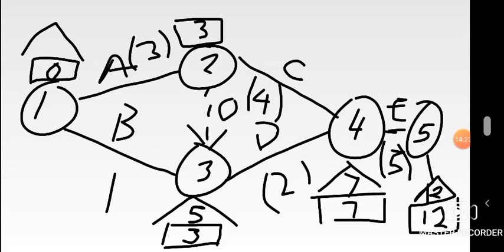That other route from 4 to 2 gave us what? 3. We said if there are 2 routes leading to another one using the latest completion time, and we are stepping backwards, we go for the least, which is a 3. So I'll just draw my weird triangular shape here because of the space on the top, meaning the triangular shape always contains, of course, the latest completion time. So that's a 3, which will go on 2. 5 and 3, the smallest was 3.